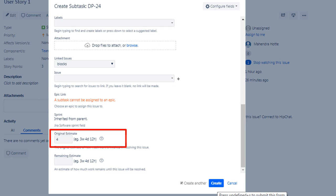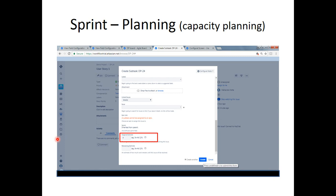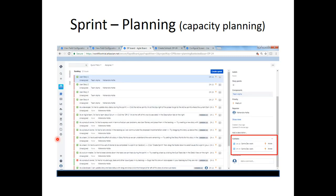The estimate to accomplish a task is given in the Original Estimate. By giving just 4 as a numerical value, it will default to 4 hours, because in Tutorial 7 we changed the default unit of measurement from minutes to hours. So the moment you enter 4 or 4h, it takes it as 4 hours. If you give 4m, it takes it as 4 minutes.